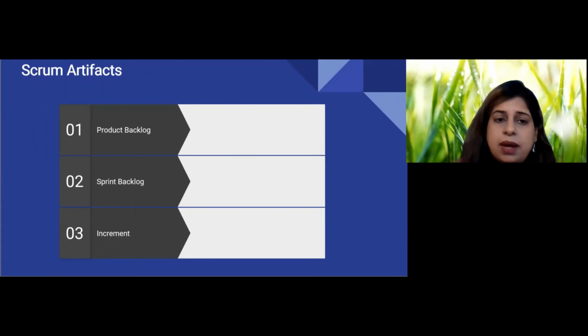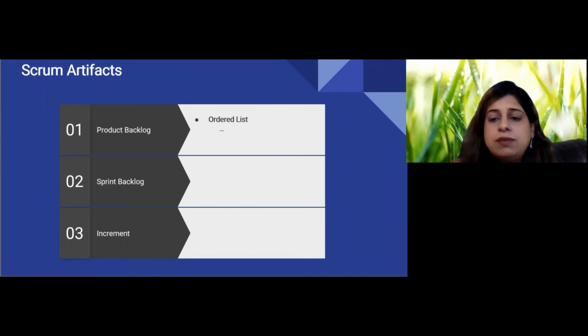There are three Scrum artifacts: product backlog, sprint backlog, and increment. Product backlog. The product backlog is an ordered list of what is needed for the product. They usually acquire this degree of transparency after refinement activities. Refinement is the act of breaking down and further defining product backlog items into smaller, more precise items. The product goal is a commitment for the product backlog.